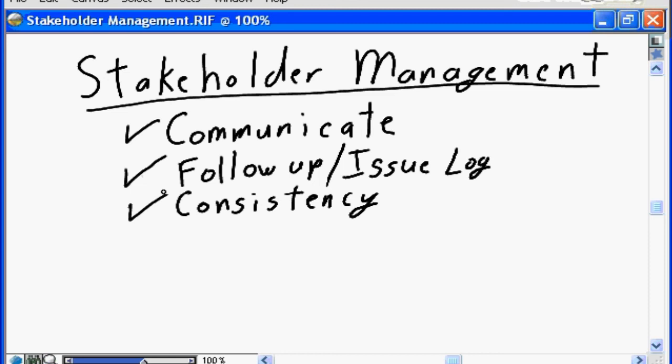Oh, Steve has always been so reliable. He's always delivered these accurate, valuable status reports to me, but he hasn't delivered one this week. There must be something really bad going on on this project. There must be something really awful happening, and the sponsor worked himself into a very high state of panic because the status report wasn't delivered on time, where in fact, I admit I failed. I didn't manage expectations. The status report was not late due to any project delivery challenges, it was simply late because I had taken 2 days off and had not properly managed my stakeholders' expectations.